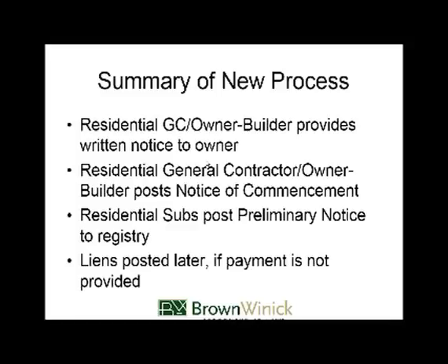But my belief would be that as long as the owner that you are trying to enforce your lien against has somehow gotten the notice, I think the court's going to give you leeway. The point of all of these items that are required, the tax identification number, the legal description, etc., is to get to the proper owner. So if you just say it's Joe Smith owns it, and it turns out it's Joe Smith LLC, I don't see that as being too much of an issue as long as Joe Smith LLC, if they're the real owner, is getting these notices.